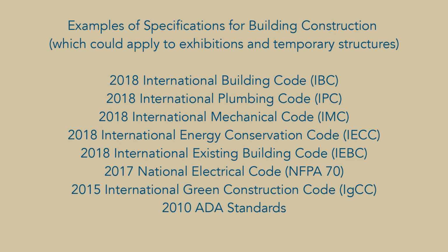If you're doing exhibitions, you're probably doing construction work. Those standards exist at the city and county level, and the state and international level. There are standards for electrical work or plumbing or wall construction. You can put all those in there as specifications. So I hope that explains the difference between specifications and tasks. Tasks, again, don't go in the project scope statement, but in the Gantt chart.